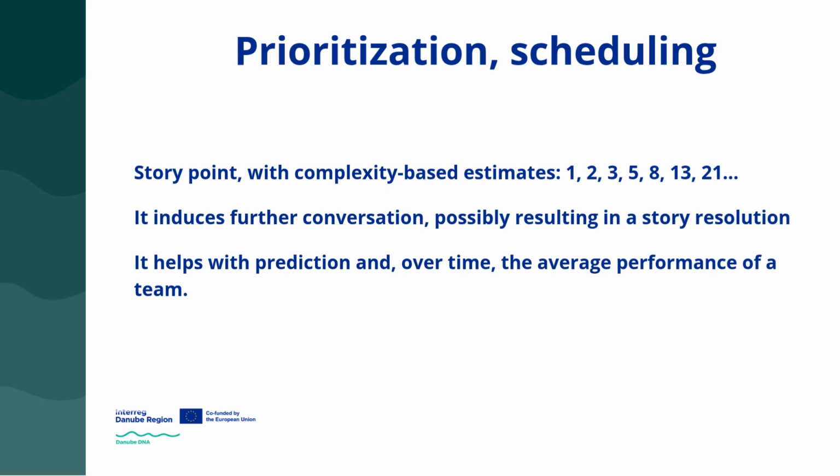This visual representation is also extremely helpful when a client expects that all tasks will be completed within 2 weeks and questions why everything is not ready by then. Here, we can visually demonstrate that a large number of user story cards are already scheduled for implementation within a given time frame. If the client wants additional user stories to be included in the iteration, we can explain that for that to happen, other stories must be removed.